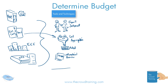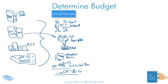Also, when we have funding come in, our funding may come at certain points in the project. If we notice that there are times where we're going to be spending more or less than what we actually have, we might need to do some adjustments to fit or reconcile it to how our funding is actually being appropriated — that is called funding limit reconciliation. There may also be times where we might not have all the money up front, but we know what we need over time, and we might have to actually use some financing to increase resources and be able to fulfill our cost needs.